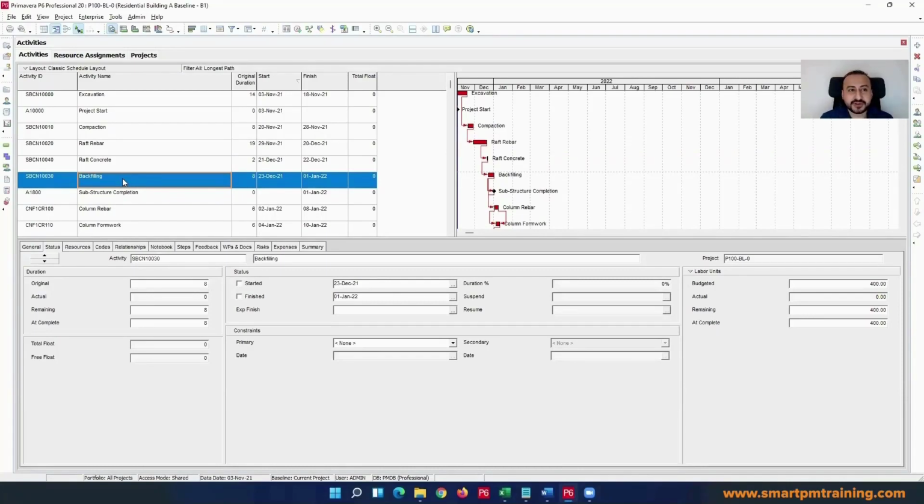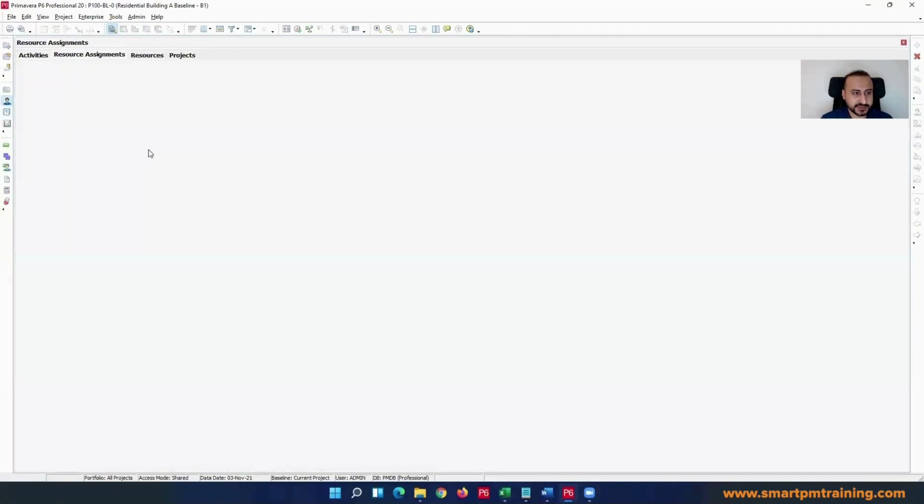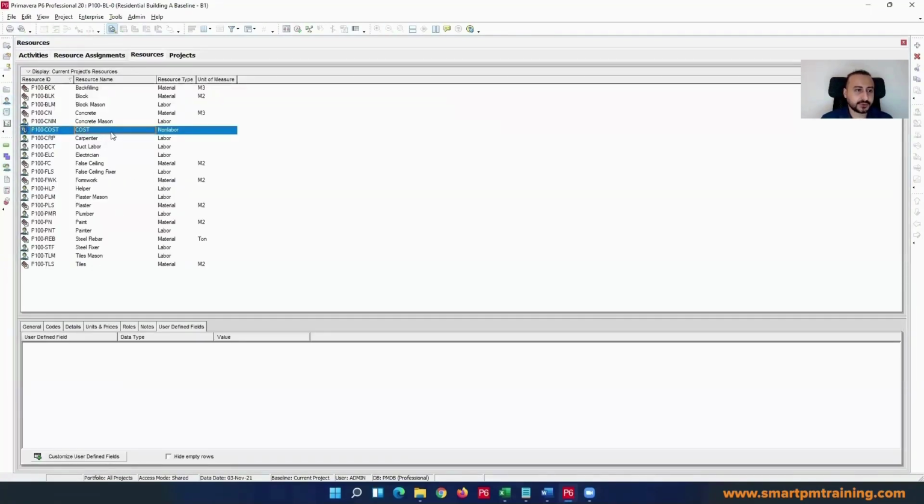Don't use the cost resource here, because it will show you that the planned value for the procurement is that value, but it's not true. You claim for the money when the material is delivered on site or when you execute the work. But when you place the LPO, you don't get any payment in your application.